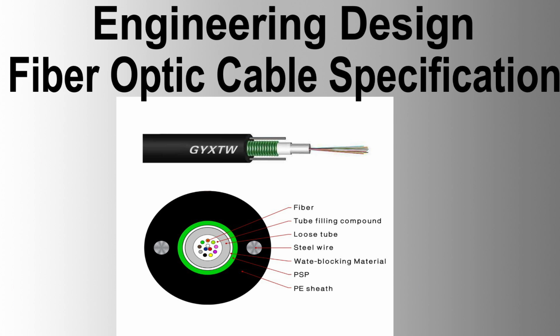The contractor shall also submit all certifications relevant to the type tests as listed in the section for the origin of the fibers and completed cable. Drum tests shall be done on-site before laying the cables. Special tests. The supplier shall demonstrate that the following type tests were performed on the fiber optic production process to guarantee quality. If the supplier has different tests or categories, they will be evaluated by the purchaser or its representatives.